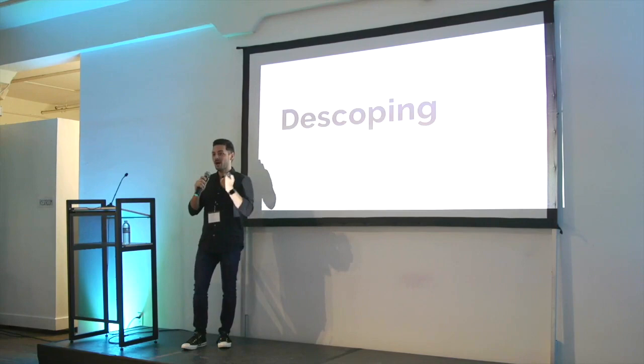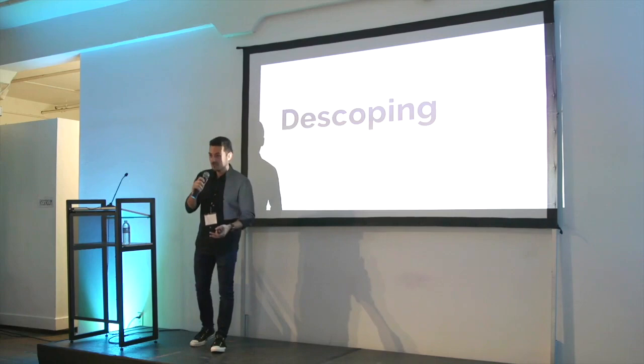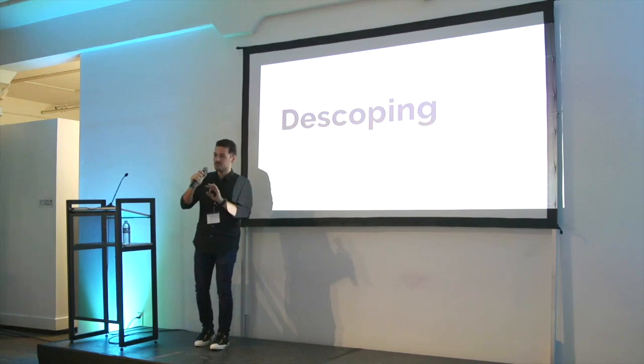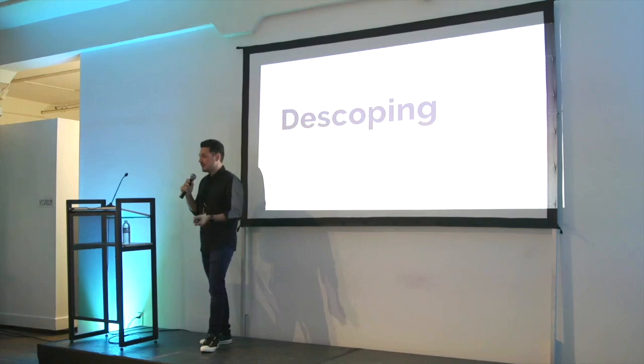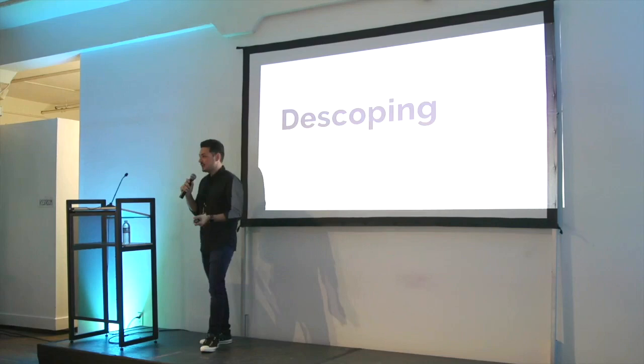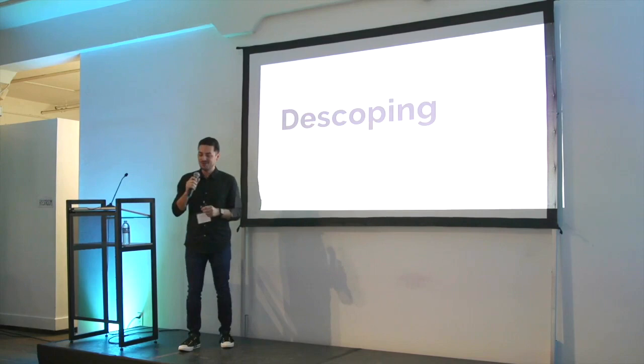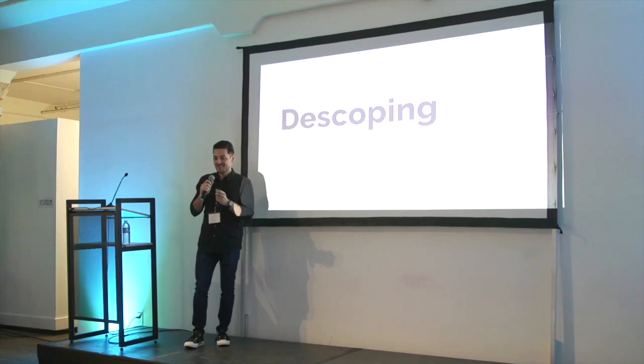This time there was a silver lining — we had the de-scoping conversation much earlier than we normally do. Because of our pre-planning, we knew where we were headed and were able to start talking about things we needed to cut before we were up against the deadline scrambling. That's a really big win I attribute to this process. The things we ended up cutting — we still had to do a little functionality cutting and some hacking to figure things out — but it was significantly less than the way we normally operate, which is a huge win. The engineers were much more appreciative. Everybody understood why we were cutting what we were cutting, and we were able to make decisions as a team. The stakeholders understood without long meetings of bartering over compromises. Everything was very lockstep. Today we're still building — we finished the de-scoping phase, we're about a week away from launch, things have been going well. Actually, we're ahead of where we thought we'd be, and the conversations are much less stressful than in the past.